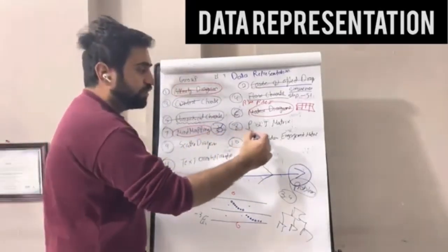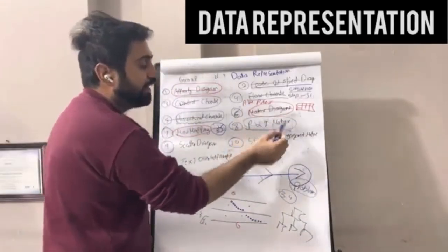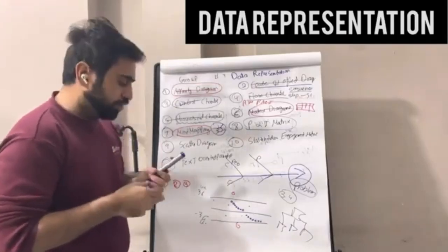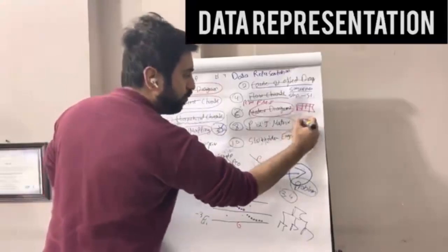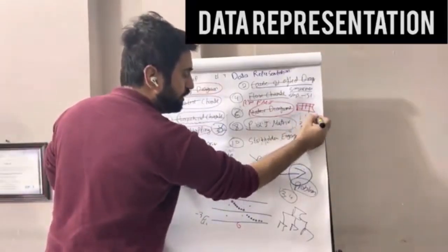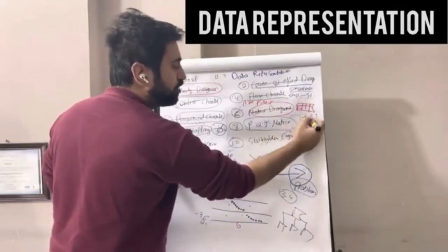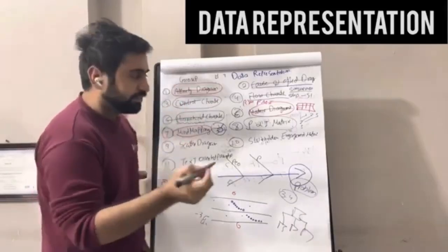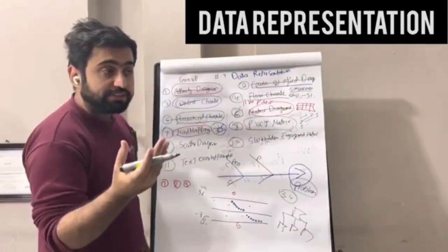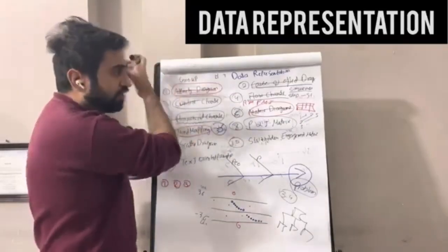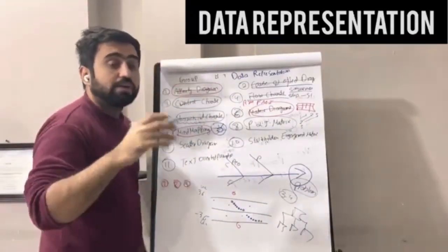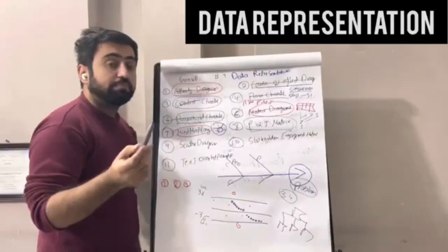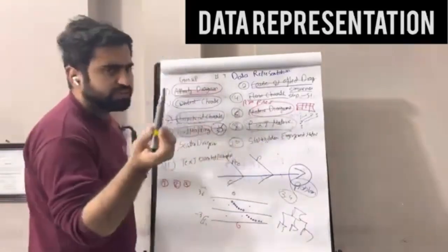Then the next is, of course, the topic that belongs to risk, probability and impact matrix. What type of probability and impact matrix are you going to use? Are you going to use a 3 by 3 matrix? Okay, 1, 2, 3, 1, 2, 3, or a 5 by 5 matrix. Depending upon the organization, you use your matrix, and you use it for qualitative risk assessment, specifically to rank the risk. So guys, you have gathered all the risks and you want to rank them, you want to categorize those risks. So we use the probability and impact matrix for that particular purpose. A specific tool used only in risk.